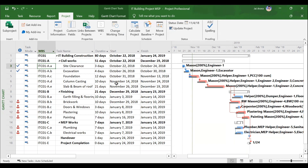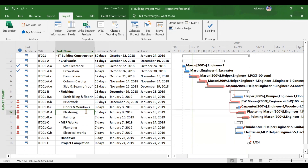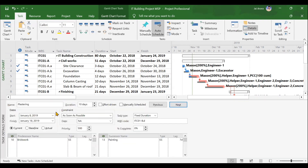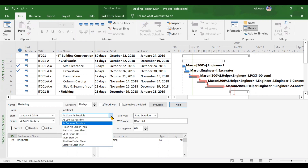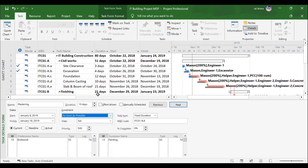You can also assign a customized calendar to a specific task. For example, suppose there is a vendor for plastering works who cannot come on Saturday and Sunday regardless of when the project is running. You will have to create a separate calendar for the plastering activity and assign it to that task. This we will understand in the assigning calendar video. After that, we will be assigning constraints. Based on client requirements — such as completing a task before a certain date or handing over the building before a certain date — you will have to assign constraints. Every constraint we will understand practically.